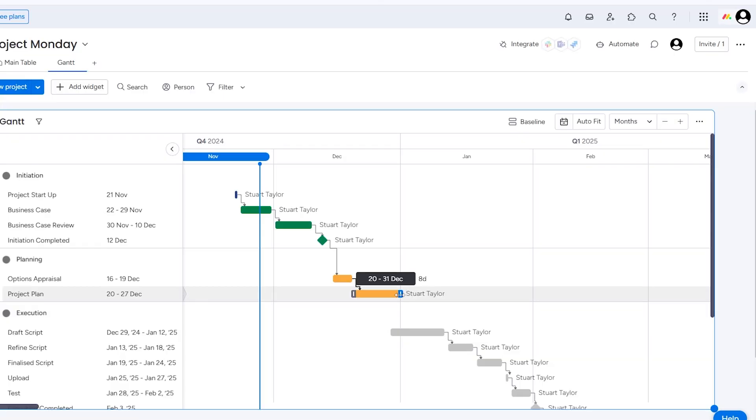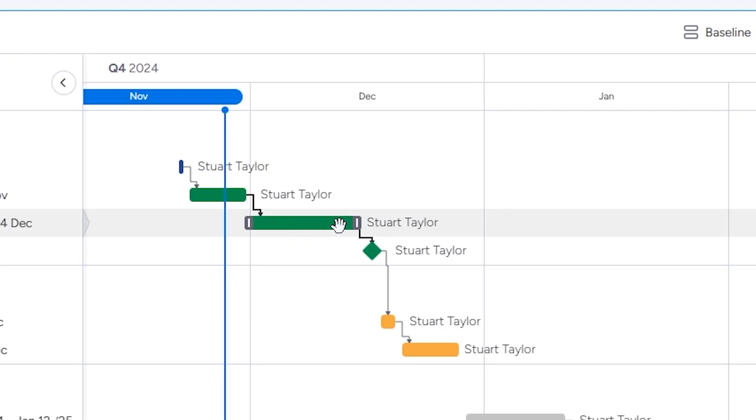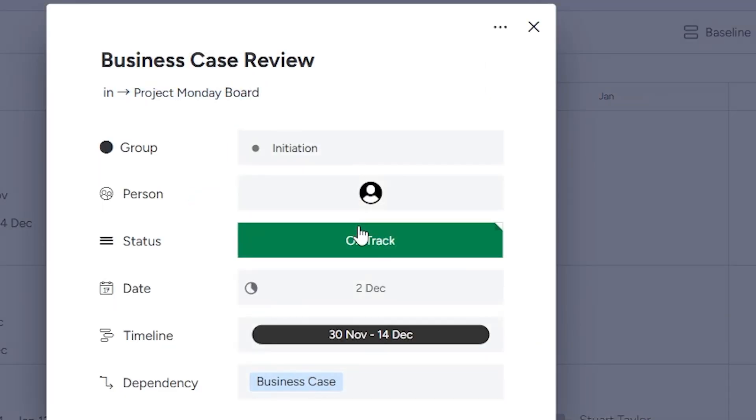When you're happy with the appearance, you can make really good use of the Gantt chart in Monday.com. It's not just a static graphic — it's interactive. You can drag bars to adjust dates. You can click on bars to edit their dependencies, deadlines, and owners. It's not quite as much fun as Tetris, but it's a hell of a lot easier than doing this on a spreadsheet.